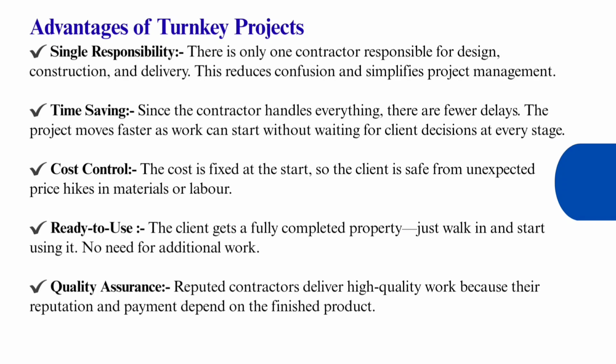The next point is advantages of turnkey projects. There are many advantages. Single responsibility is one advantage, that there is only one contractor responsible for design, construction, and delivery, and because of this it reduces confusion and simplifies project management. The next advantage is time saving. Since the contractor handles everything, there are few delays. The project moves faster as work can start without waiting for the client's decision at every stage.